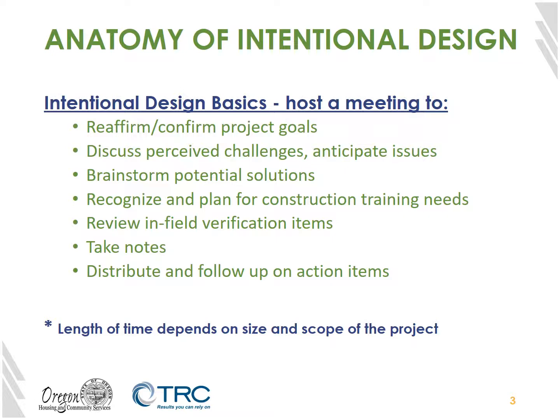Now that we've created the list and a basic agenda for our pre-construction meeting, we need to think about what are the basics that will make this a successful meeting. The basics will always start by confirming the project goals and ensuring that these are adhered to throughout the discussion in this meeting. The next will be to identify the perceived and real challenges and hurdles that may get in our way to putting in new energy efficiency measures. Some of these may be first cost type of hurdles, others may be impacts to sequencing or to the use of space, such as chases in between floors, conduits, etc.